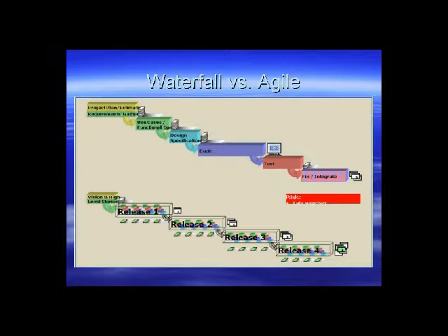Some of the inherent shortcomings are that the product isn't visible by the customer and can't be reviewed until the project is nearly complete. If there is rework or changes to be done, the process needs to go back nearly to the beginning, to the functional specifications and design specifications, and causes excessive rework and unnecessary product delays.